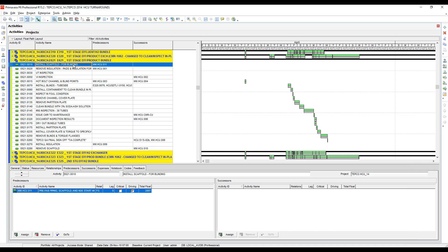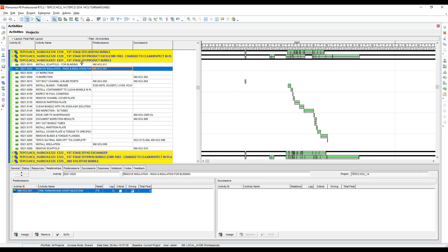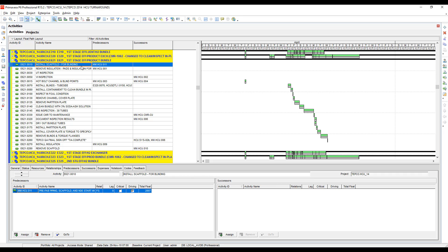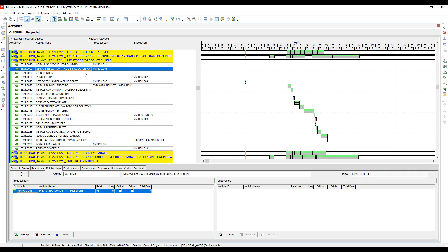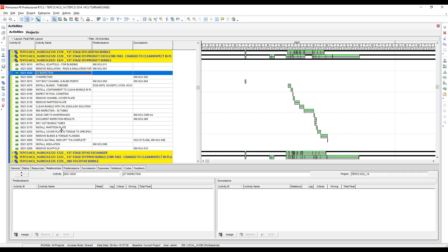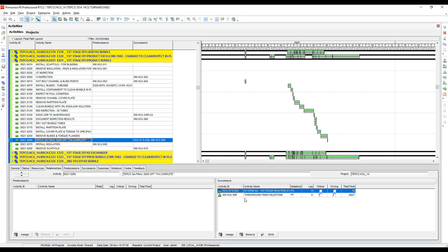Like I said, you may have something tied off to another area within the schedule that did not get removed. You can see on these activities right here that is the case. I do have some other activities there where the predecessors were not removed, and on the flip side of that, you may have some successors that were not removed, so you may have to go in and manually remove those.